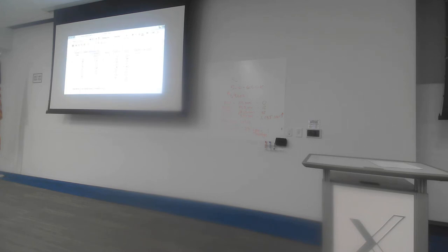And then beside that, we've listed all the different crash situations that we could possibly have out of these different activities. So for instance, my normal duration of activity A is 2 days. That would be the normal duration that it would take to complete this task, given the resources or the different personnel that I've allotted to that task. I have decided as a project manager, having looked at it and investigated more closely, that I can possibly crash this activity down to 1 day if I really need to.